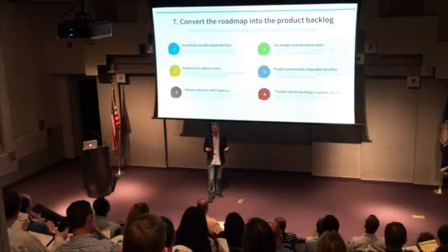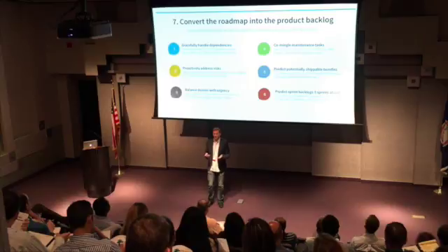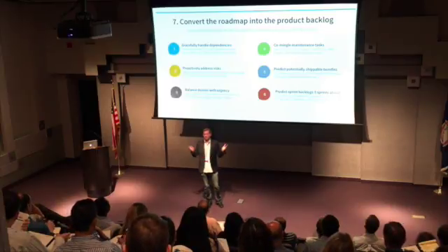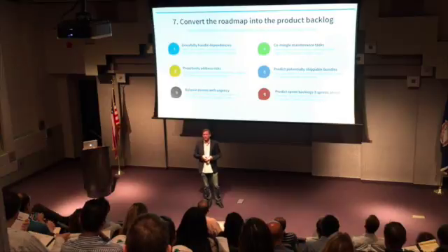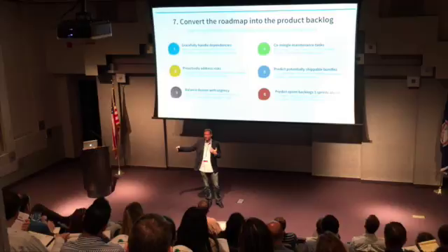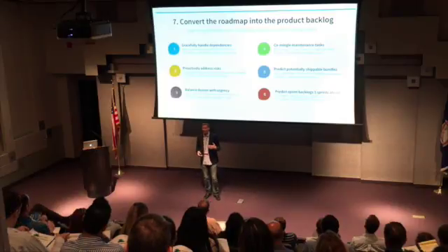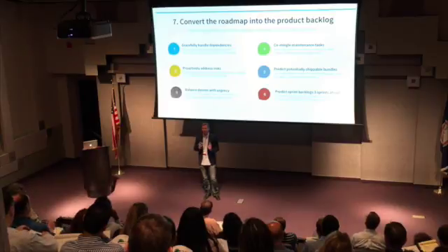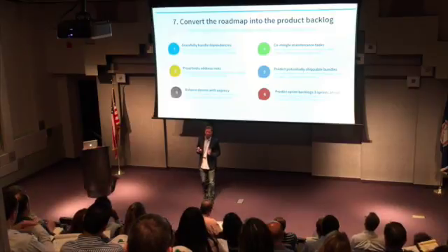Or if I'm in marketing, right? You can't just say, hey, in 2 weeks' time we're going to have this feature roll out. You can say, hey, it takes me more than 2 weeks to get all the press release stuff organized. Can you give me a sense as to what you're expecting, so they can start to do their work? Now, if you pull back and decide not to release that thing because it's not potentially a releasable product or you didn't get it done during the sprint, that's okay. You tell them as well, hey, let's pull back on the marketing plan as well. But at least give them a heads up as to what the expectations are going to be.